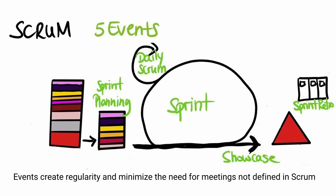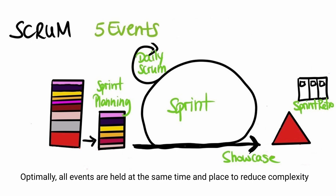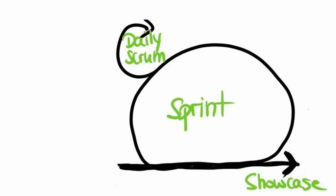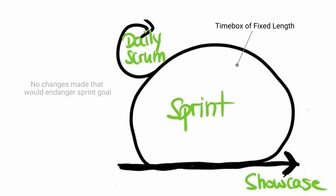The Sprint. Sprints are the heartbeat of Scrum. It is a time box of fixed length which creates consistency — usually two weeks. A new Sprint starts immediately after the conclusion of the previous Sprint. During the Sprint: no changes are made that would endanger the Sprint goal, the product backlog is refined as needed, and scope may be clarified and renegotiated with the product owner as more is learned.